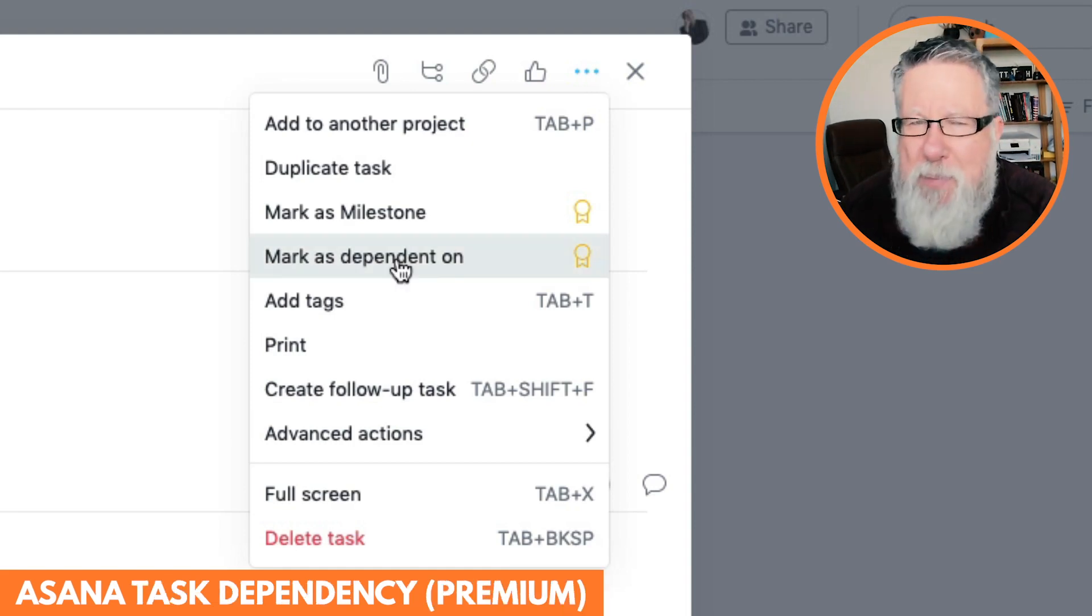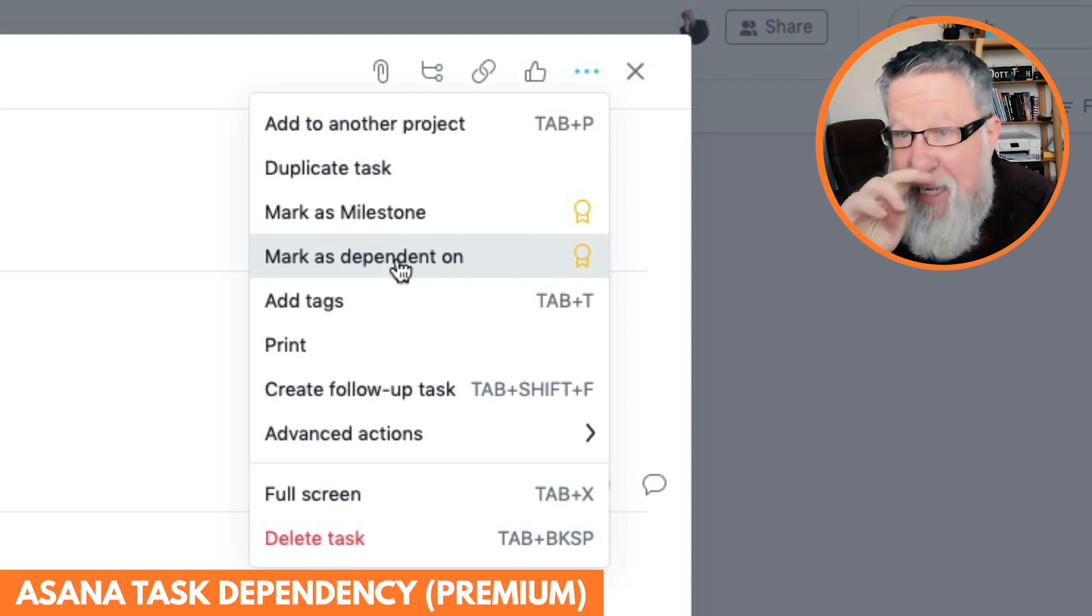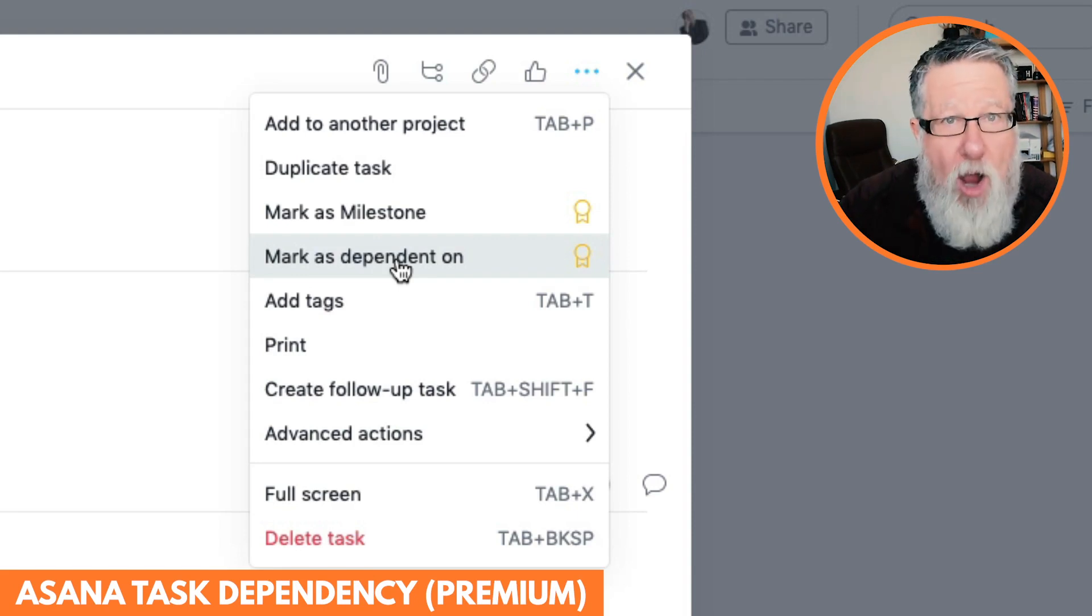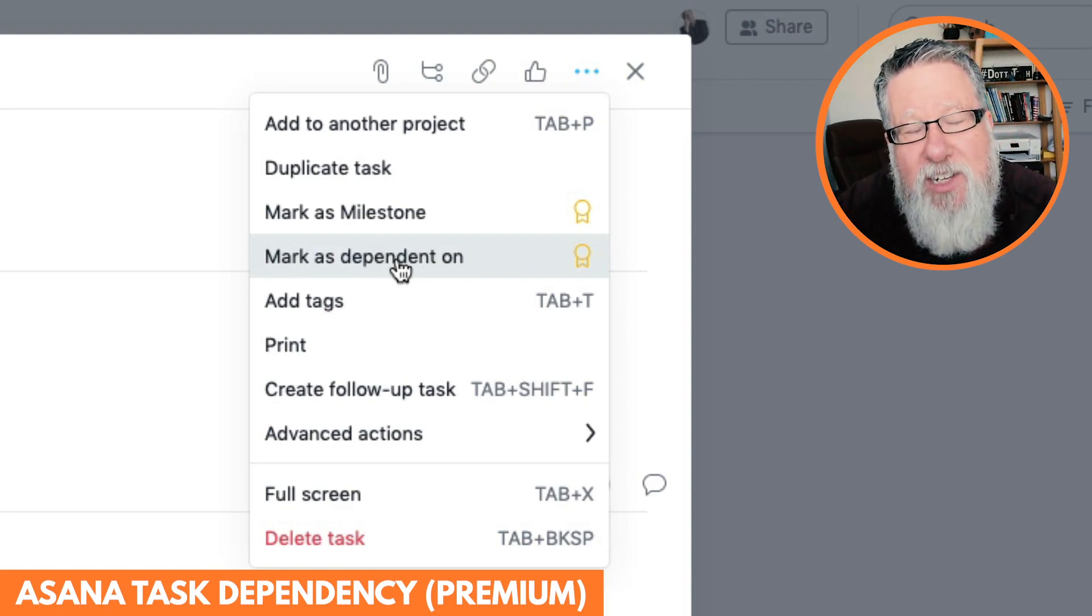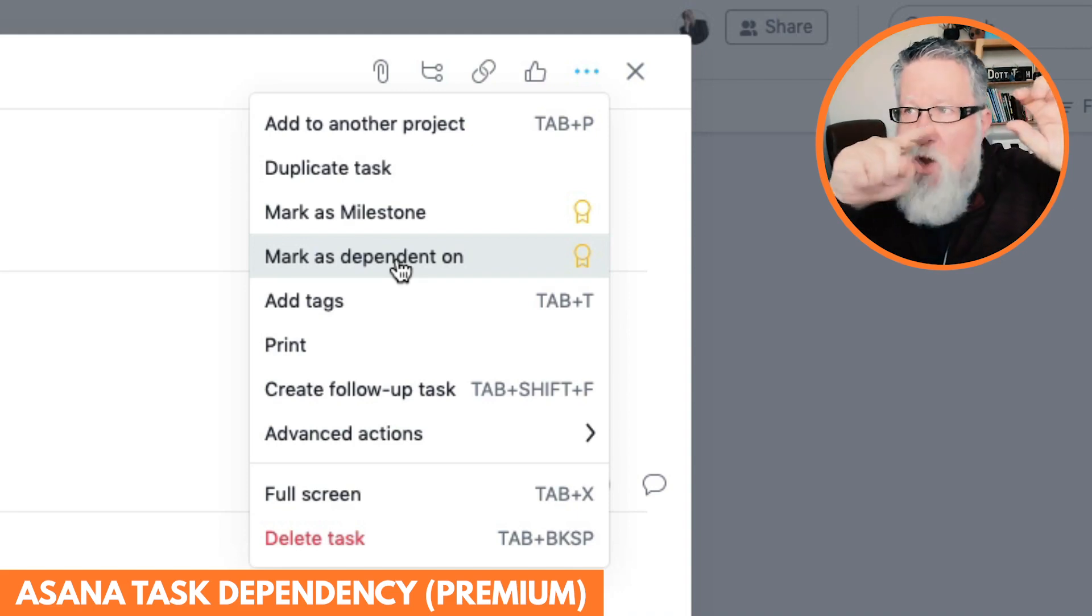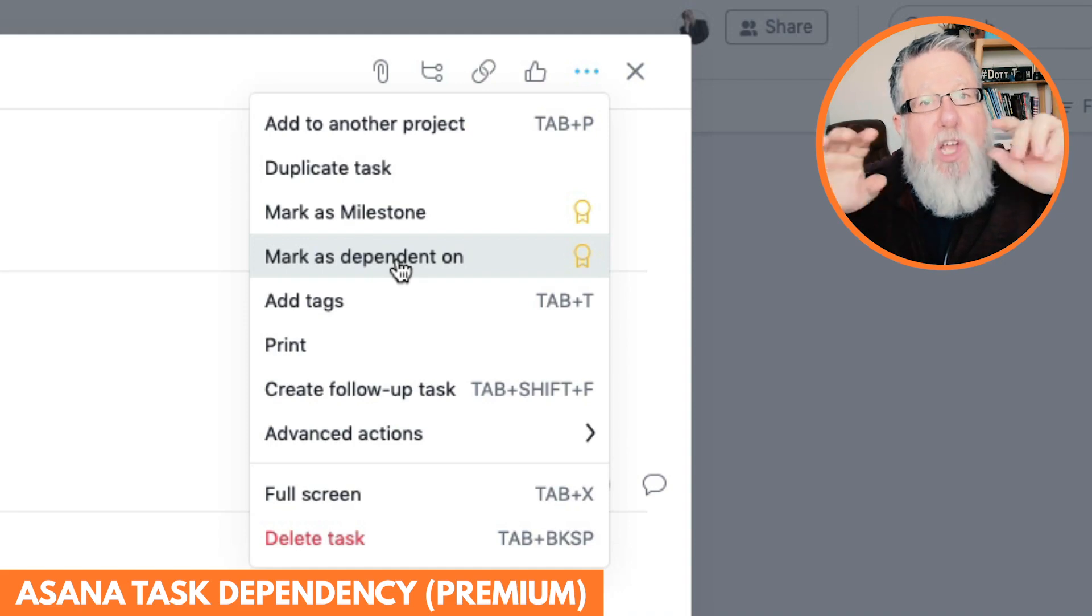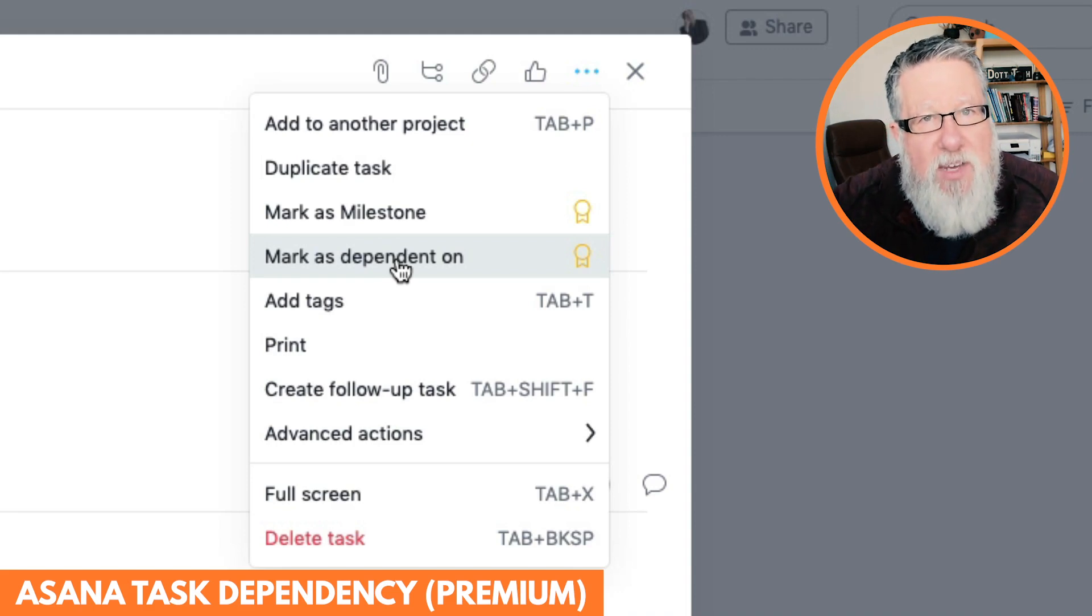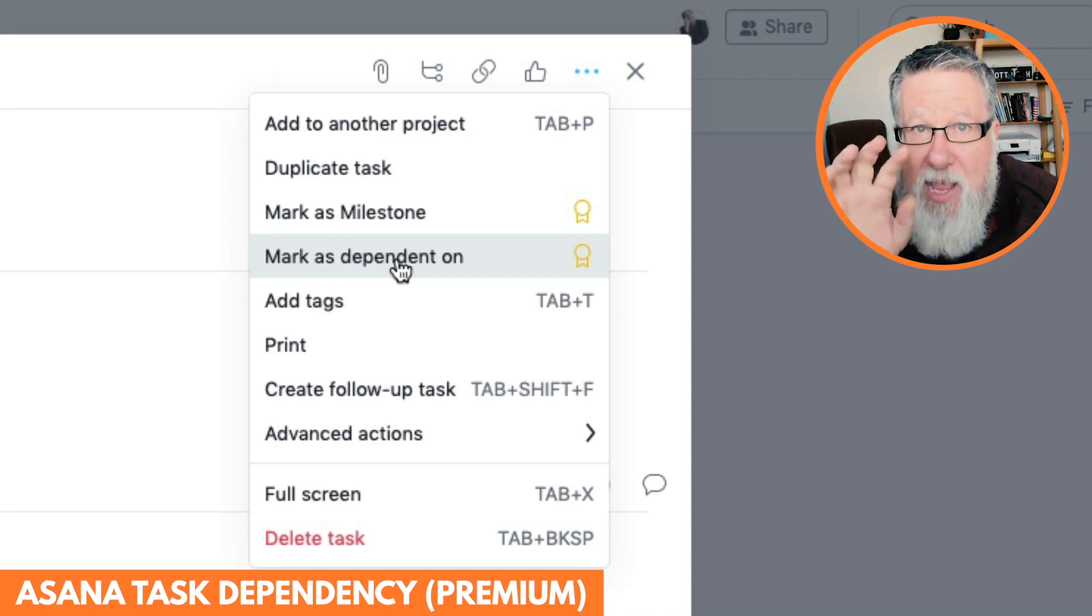You can mark it as a dependency. And creating dependencies is the one reason that I'm really looking forward to upgrading when I do eventually upgrade our version of Asana. Because dependencies allow you to do this. When this task is complete, then notify the next person that their task is due. Creating a dependency where one task gets assigned, based on the completion of the task before. It is a terrific workflow management feature.